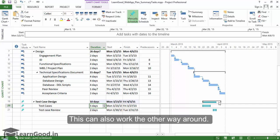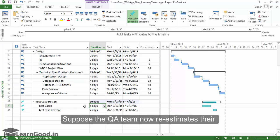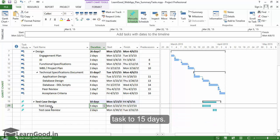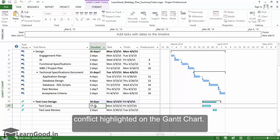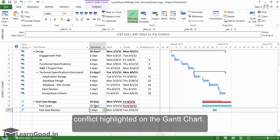This can also work the other way around. Suppose the QA team now re-estimates their task to 15 days. As soon as I enter this, I see the red conflict highlighted on the Gantt chart.